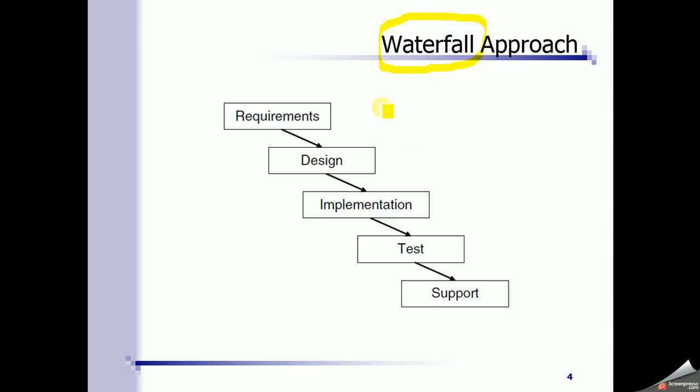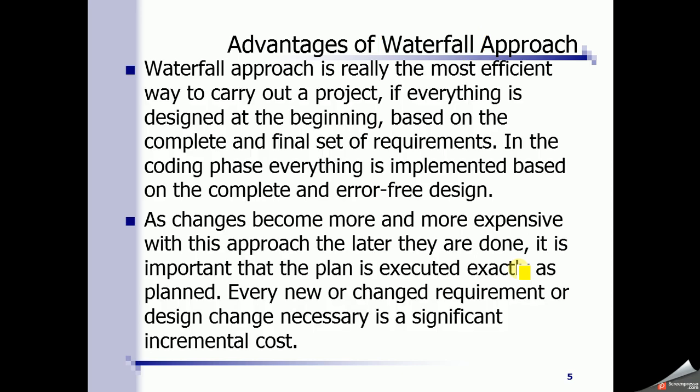In waterfall, the water always goes from top to bottom. It never goes up, right? So similarly, in the waterfall development approach, every phase is completely done before moving to the next phase. So we have complete requirements, we develop a complete design, we have complete implementation, complete testing and support. So the idea is every phase is completely done before starting the next phase.